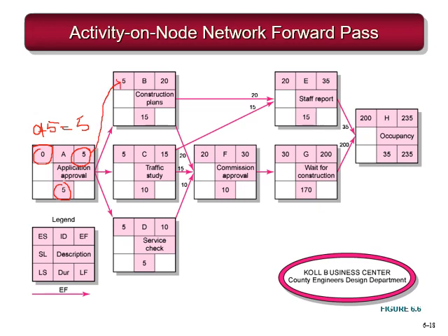So the earliest start of activity B is on the 5th day, or basically on the end of the 5th day, when you can start activity B, and it has a duration of 15. So the earliest finish time of activity B is 5 plus 15, which will give you this 20. Okay, now the interesting thing comes here.